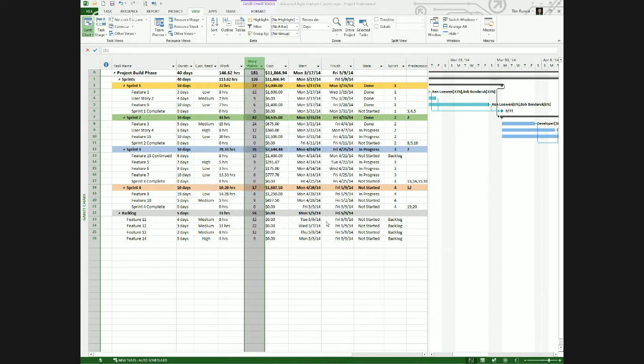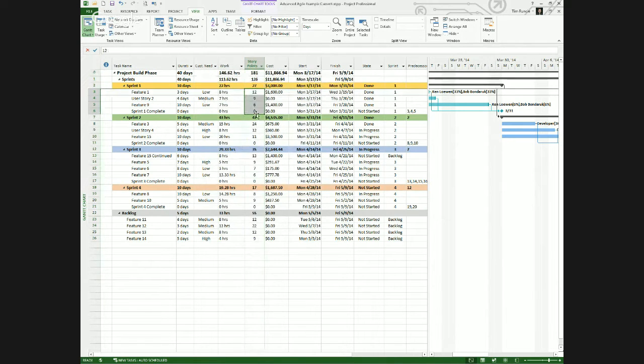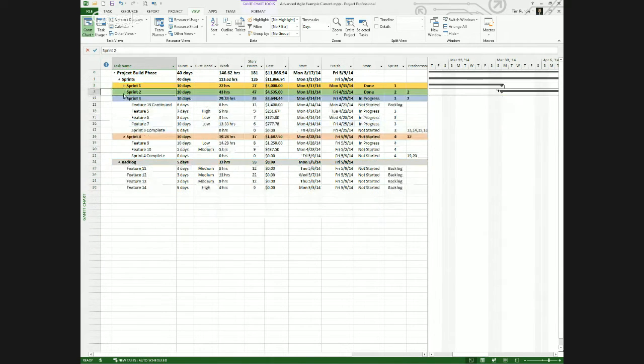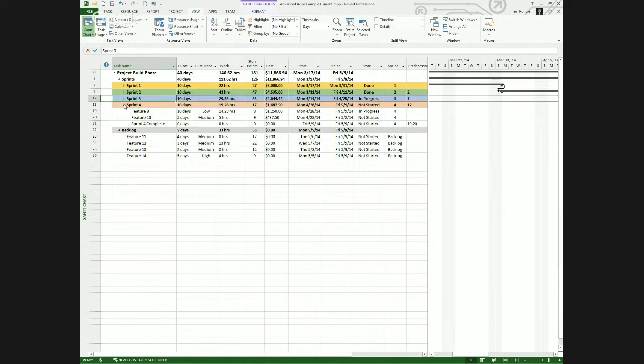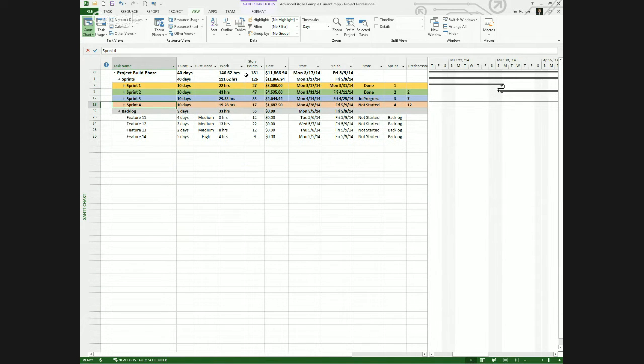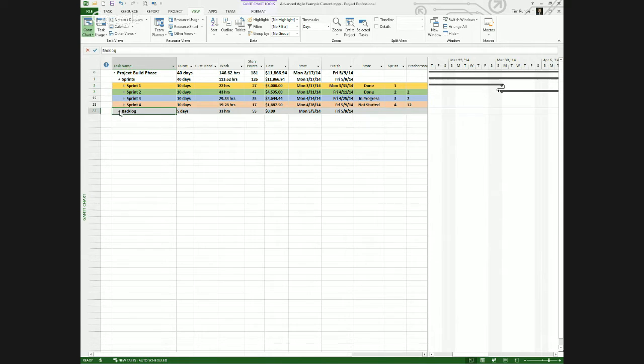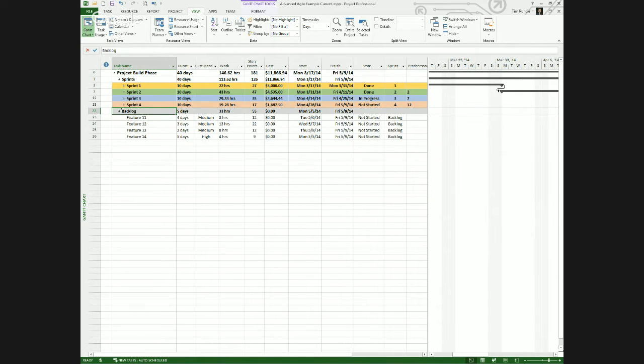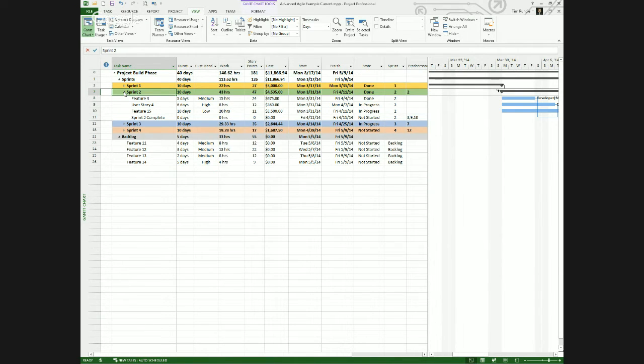But I need to know, hey, I want to roll up these values. In fact, I like the idea of story points to give me an idea by sprint that if I'm collapsing and saying, okay, we've got our planning exercise, I think we've got our priorities mapped out, how are we doing? Hours may be all over the place, but I'm looking at that complexity factor going 27, 47, well, that's pretty heavy. Well, you know what? Maybe sprint 2 should shed some of the weight, and we can roll that down into sprint 4. And of course, our backlog is what we refer to as that parking lot, meaning activities that I may want to break apart, pull forward, or pull down.